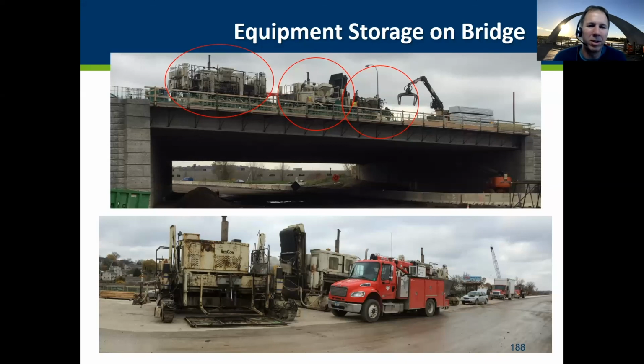It was equivalent to 1.5 times the design vehicle. And luckily, it wasn't moving at speed for the impact, the increased impact, but we had to get the contractor to submit weights for this, haul the equipment off, store it elsewhere. So look for those things.